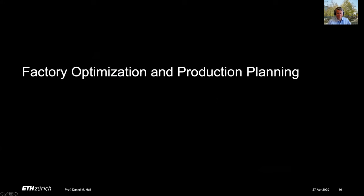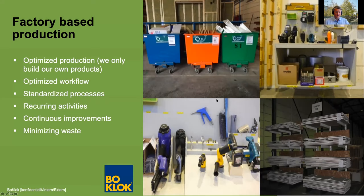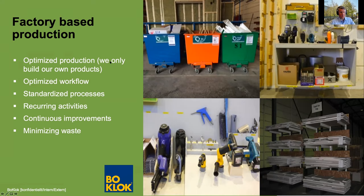On the other side, we have factory optimization and production planning. Here we get into the details of factory-based production. I went back and talked with my colleague Yerker Lessing, and I share some slides from Bookluk. They only build their own products — not for somebody else. They optimize their own workflow through reuse and continuous improvement, standardize their processes, focus on recurring activities, continuing improvements, and minimizing waste.